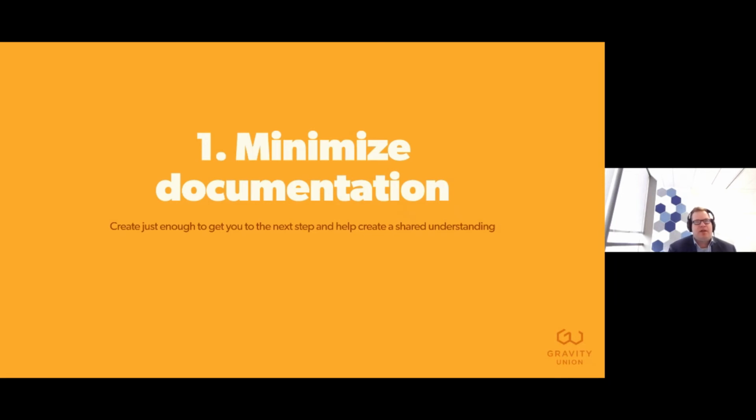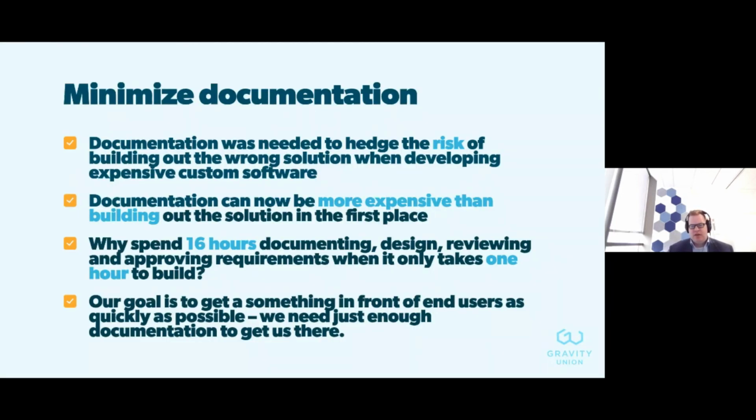The first thing is to minimize documentation. Originally, when we think about processes and systems and tools and software, documentation was needed to hedge the risk, or so we thought, of minimizing the amount of effort spent on the expensive area of software development, but that also created the value. Documentation can now be a multiple of the effort and cost of the actual business solution. Again, take that one example, one document library that took them 16 hours and 3 or 4 days from start to finish from a duration perspective. You could have configured that by hand in 5 minutes.